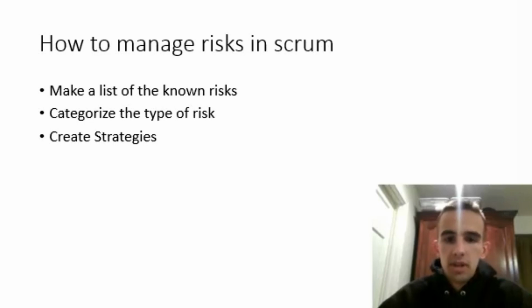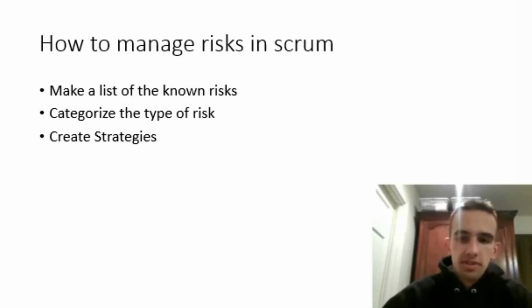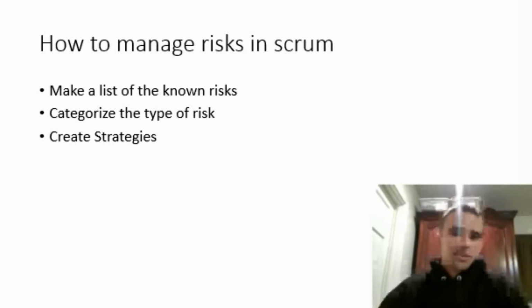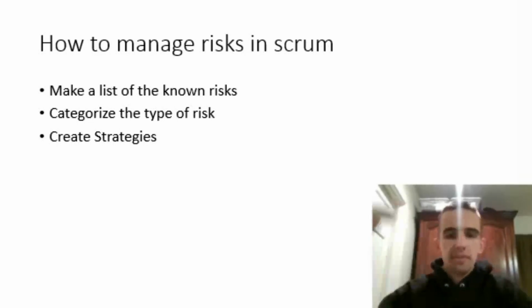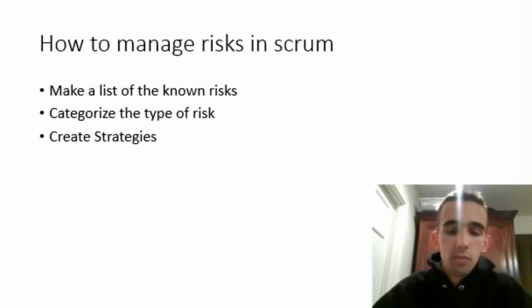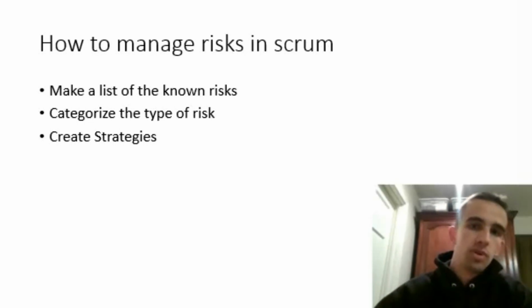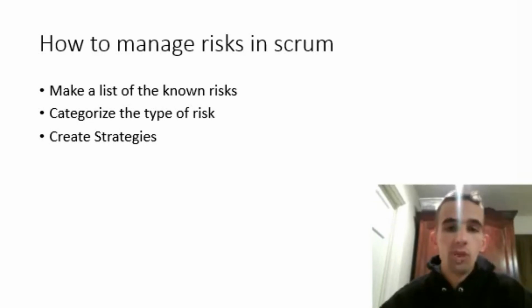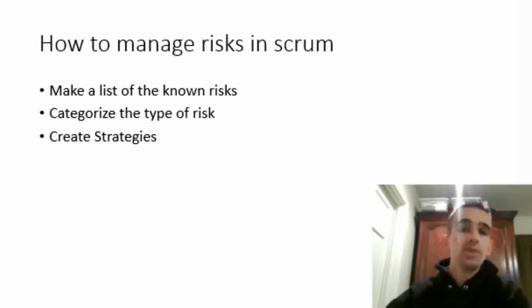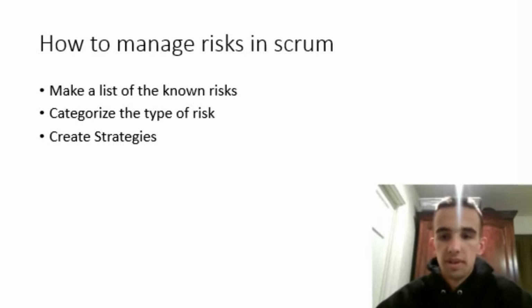So once you've made that effort, just refine your list frequently. Otherwise, you could end up with a list that seems very thorough, but it's really kind of obsolete now. You need to go through and frequently refine the list and add more risks as the product backlog gets bigger, as the PO is coming up with more things for future sprints. It's important to stay on top of what risks may be there in those certain items or related to those things that we'll be doing.